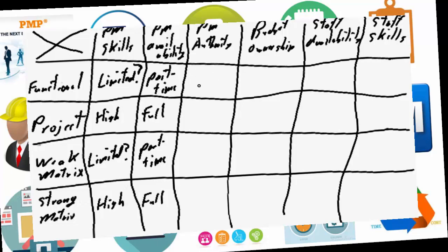In terms of the authority, in a functional area, it's going to be a wide range. The functional manager is going to be using staff from only within their business unit, so the assumption may be that they will have a high degree of authority over their staff, which may be a very valid assumption, but because we're picking and choosing staff members from everywhere within the business unit, they may have some limited authority over the project team members from the different managers within the business unit, so they may have low control over that.